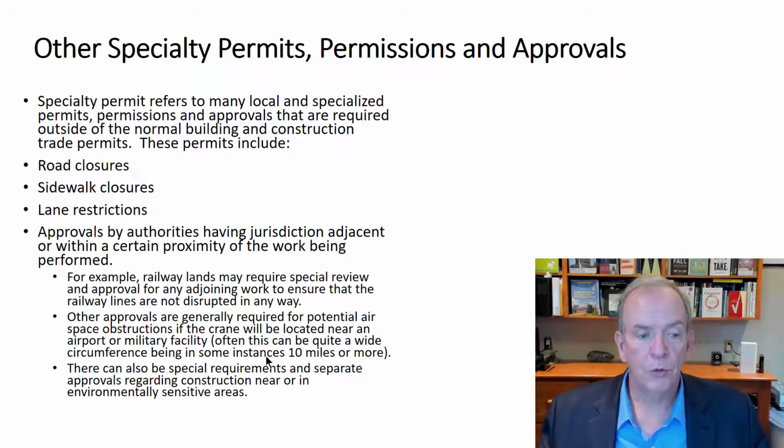Even putting up a crane near an airport or a military facility, you can often require a special permit for that. Downtown Toronto, a lot of times with the cranes, you have to have it coordinated because, like, Sick Kids Hospital has helicopters that come and go with emergencies. So there has to be a coordination with the cranes that are operating downtown to ensure that they can have access. Fly zones like around de Havilland Airport, basically around Yorkdale.